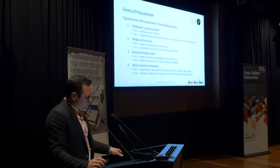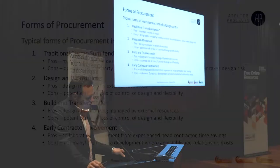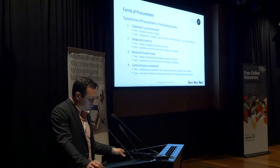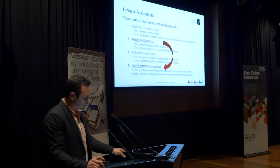There are four procurement models, probably three of which are more relevant. You've got a traditional lump sum tender — not much of this is happening at the moment. Design and construct is the default position; the majority of projects procured tend to have gone down a D&C process. Build-to-transfer is not very common but does exist in small areas. And then you've got early contractor involvement. I want to compare the default D&C option against what we believe is the most efficient and collaborative way of procuring a project: the ECI process, or early contractor involvement.